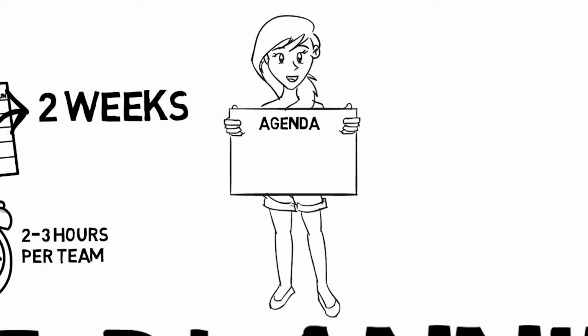The possible agenda for the meeting can be that the product owner starts with the suggestion of sprint objectives, and the teams maybe discuss it. And the next step can be that the Scrum Master presents the capacity of the team. They have to agree on how much they can take in the sprint, how much work they are going to commit to. And in the end, they finish with some risk agreement on how we are going to mitigate that risk so we can be a success in the team.